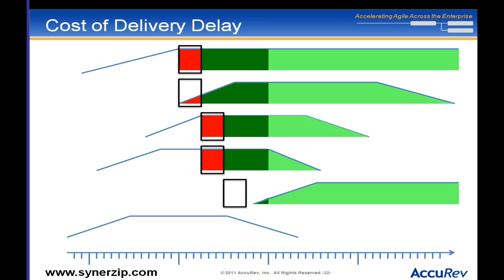If instead I could do something incremental — deliver the top two features quickly, the next two a little after that — I'm going to get all of the dark green revenue, and I'm going to get more of that revenue earlier. I can also use that to make decisions: that thing at the bottom — why even bother? By the time I get it done, its value is going to be pretty much gone.